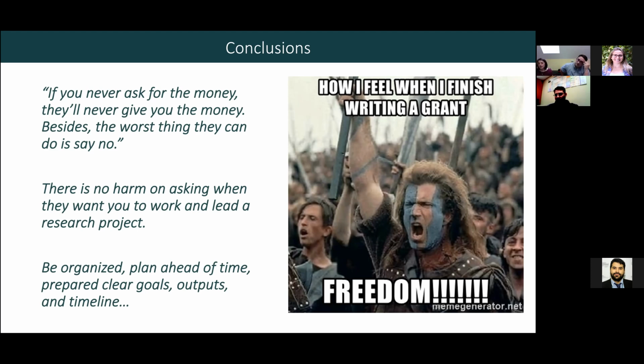1 week. Okay. From the writing side, I will say that it depends really on the size of the grant. If you have a grant that you are targeting that is $10 million, and you know that you have 10, 15 people, you need to start probably at least many months earlier. If the application deadline is in September, October, I will start right now.